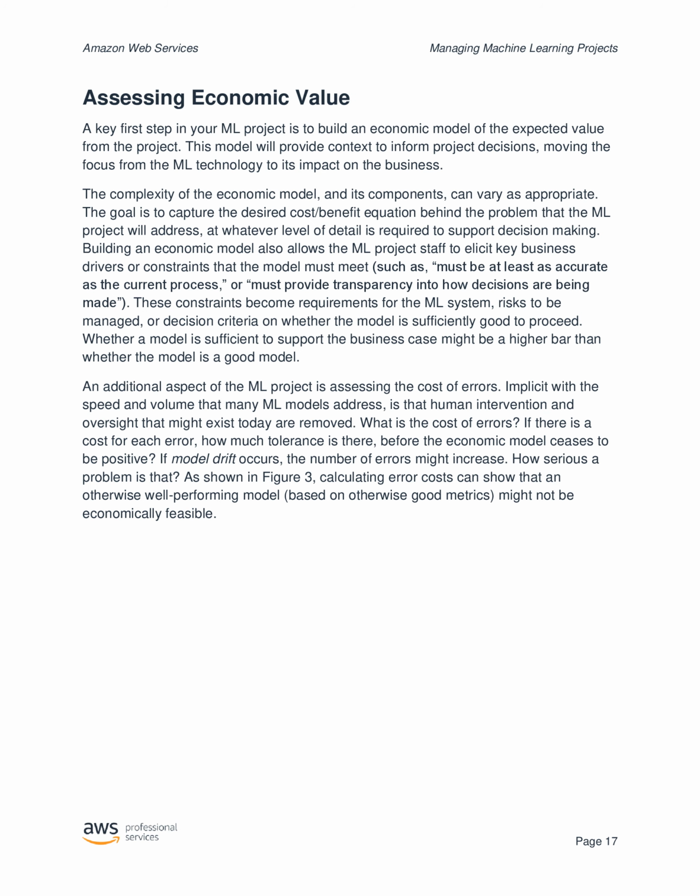An additional aspect of the ML project is assessing the cost of errors. Implicit with the speed and volume that many ML models address is that human intervention and oversight that might exist today are removed. What is the cost of errors? If there is a cost for each error, how much tolerance is there before the economic model ceases to be positive? If model drift occurs, the number of errors might increase. How serious a problem is that? As shown in Figure 3, calculating error costs can show that an otherwise well-performing model, based on otherwise good metrics, might not be economically feasible.